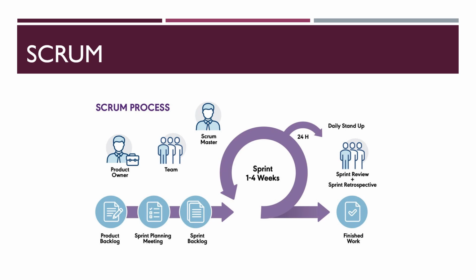Scrum is an agile methodology, and here it divides the project into short iterations, usually between 1 to 4 weeks in length. Each iteration is called a sprint here. So in the agile model, inside Scrum, the iterations we call a Scrum sprint. The Scrum Master leads the team, and they work together to deliver an iteration at the end of each sprint.